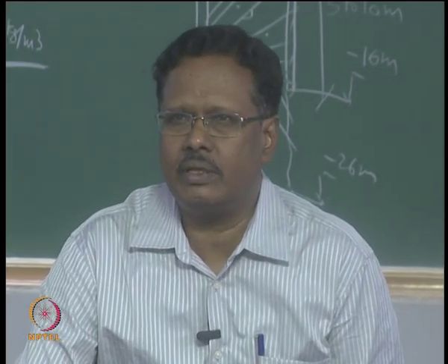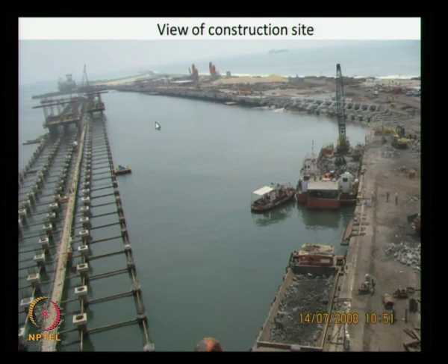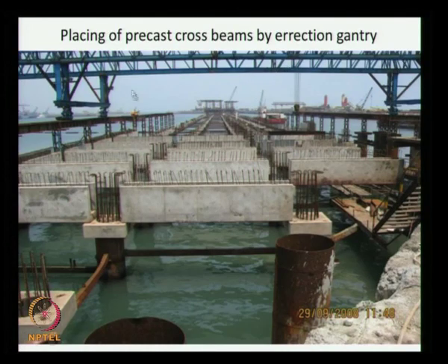So what they have done is, there are 2 ends for this, starting from this end. This is the southern end, this is the northern end. In addition to these 2 gantries, they started from the other end also with another 2 gantries to achieve the target. So time is the essence of the project, for which you have to mobilize this equipment. And the space given for them is somewhere here only for precast yards. They don't give good space, so space management also becomes a problem. And this type of gantry, which is made of 30 meters running on the rails, is also essential. So once they complete these piles, pile caps and precast units like this, then they can pour the concrete and then continue the deck slab. They will place the beams in between and then do the in-situ concrete.